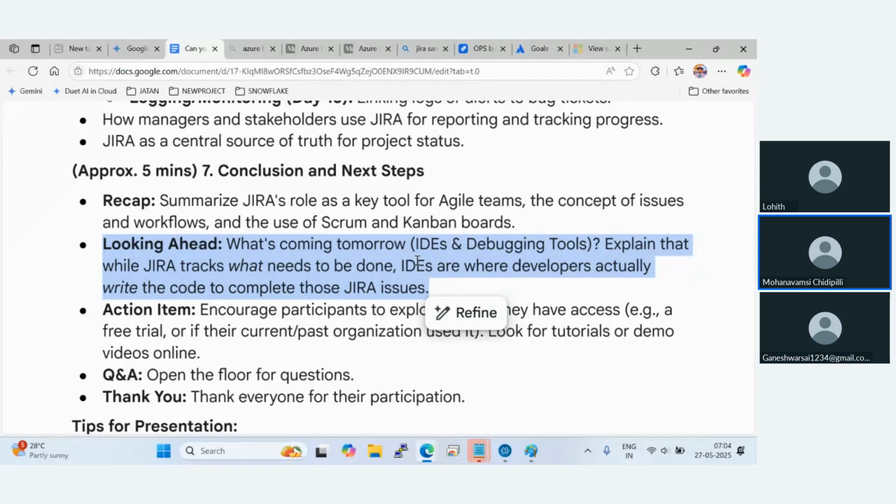The epic will be construction of the home, and the features will be a hall, a bedroom, the washrooms, and a balcony. Under that hall, we can have multiple stories: a cupboard for this one, a cupboard for the fridge, maybe some interior decoration. So everything comes as a story, and each story will have multiple tasks. If we go with cupboards, what is the budget for that cupboard? How many fittings are there? How many screws do they want to have? I'm just giving some basic examples. Just apply a similar thing in a project.